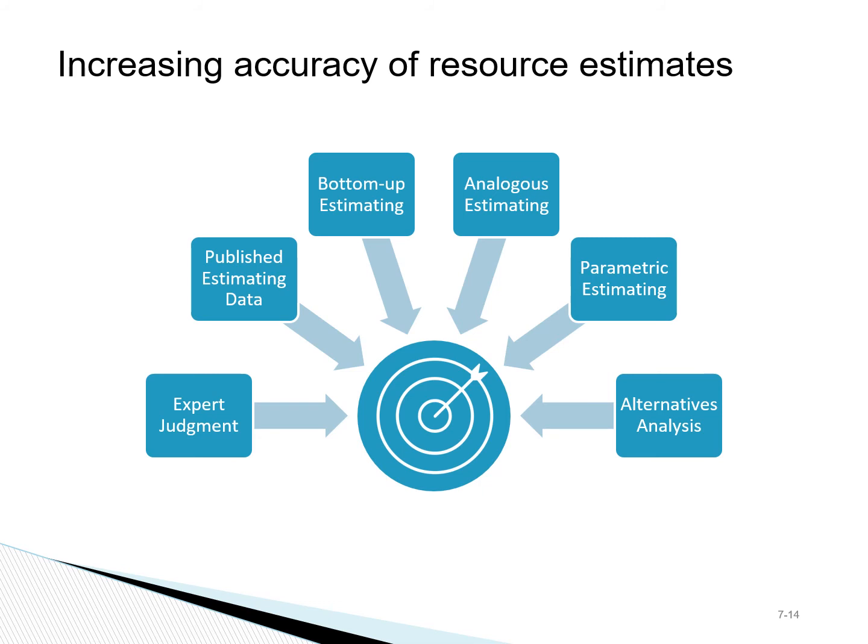We also need to consider alternatives when we are estimating the required resources, and in some cases, to optimize the schedule, we may need to consider alternative ways, for example outsourcing an activity if that particular activity is a bottleneck for our project.